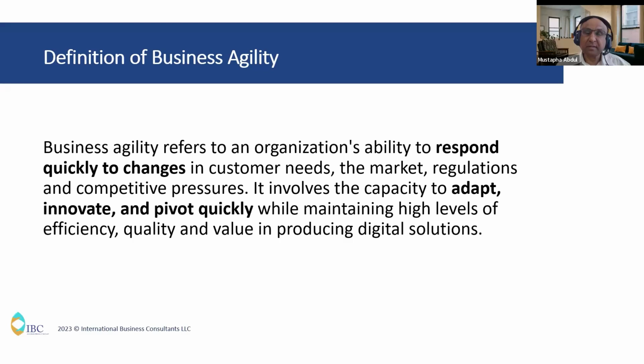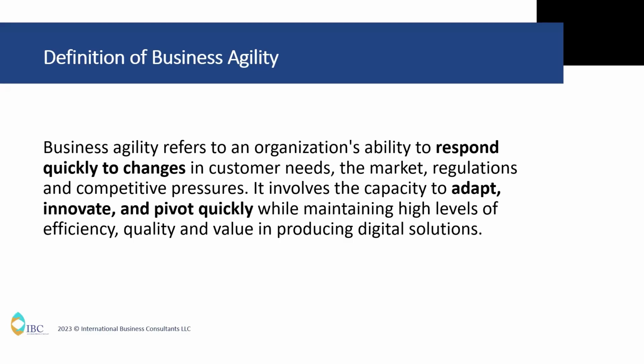Mm-hmm. Yeah. And Kumar, did you have anything to say? So yeah, SAFe we use for the collaboration with the product team and various departments. It's more of using the PI, program increment planning session, with the collaborations, and also the adaptability and quickly responding to changes during the execution, where there are some changes in the priorities and changes in those features within the committed features for the particular PI. That usually has been taken care of using some of the ART sync meetings.